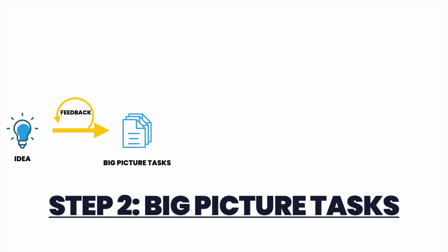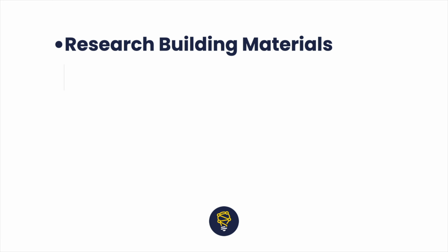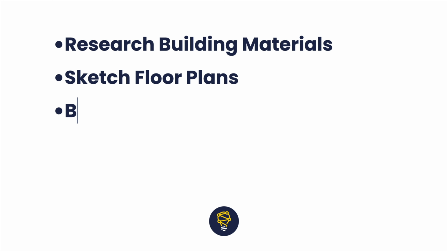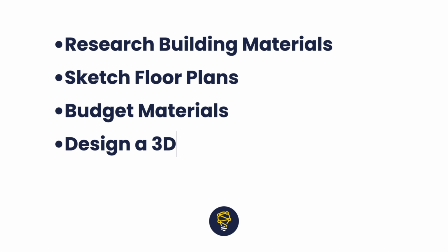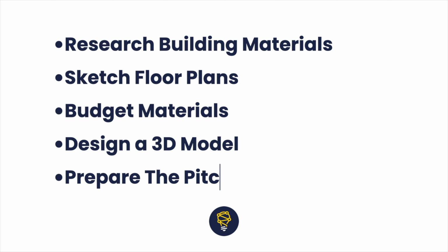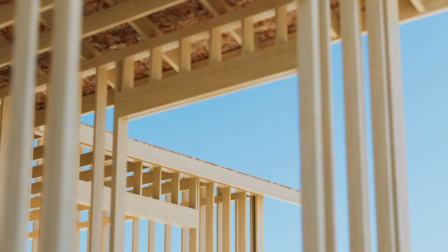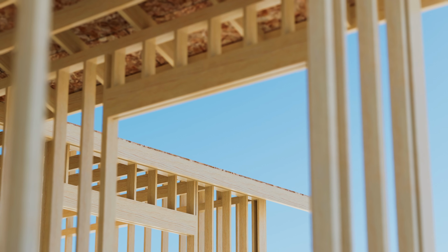Step 2, big picture tasks. Once the idea is solid, it's time to zoom out. Each team maps the major tasks they'll need to tackle. For this project, that might include research building materials, sketch floor plans, budget materials, design a 3D model, prepare the pitch. No assigning tasks just yet, just identifying the major work. Think of it like rough framing before the construction starts.